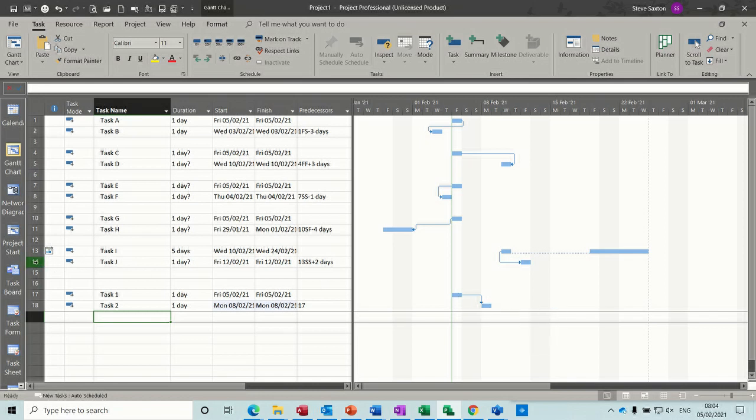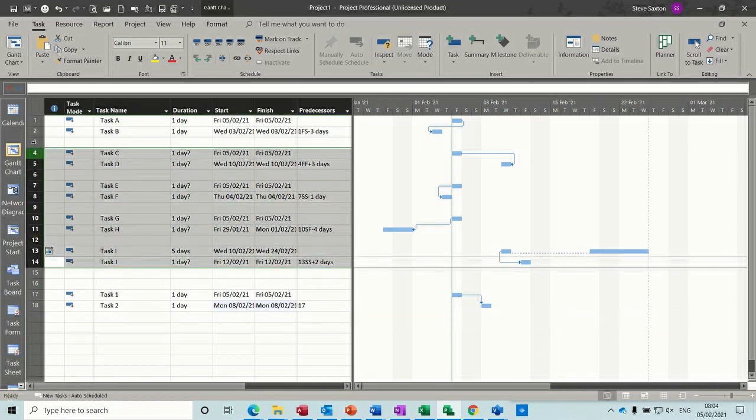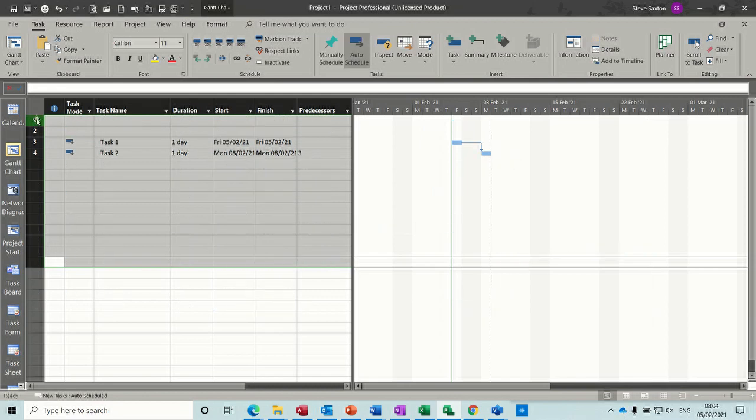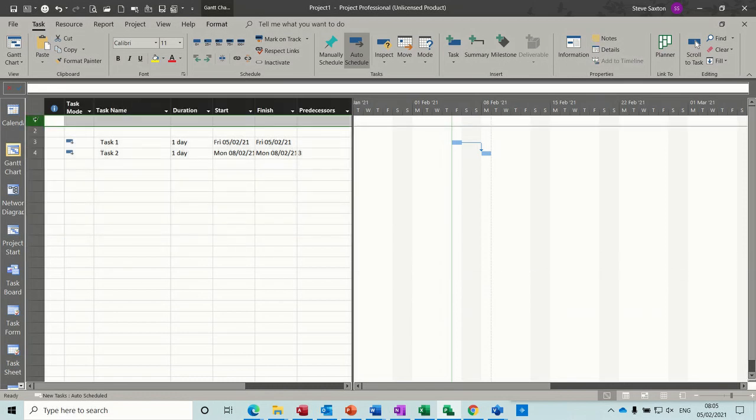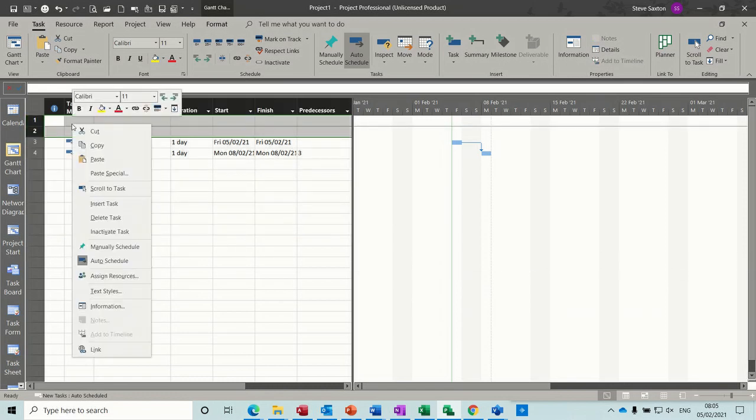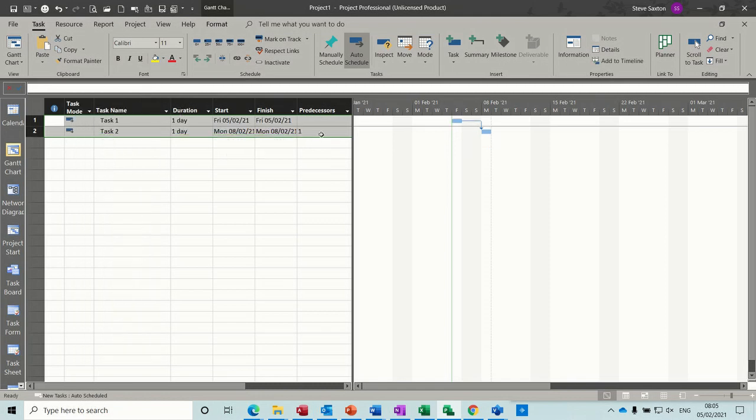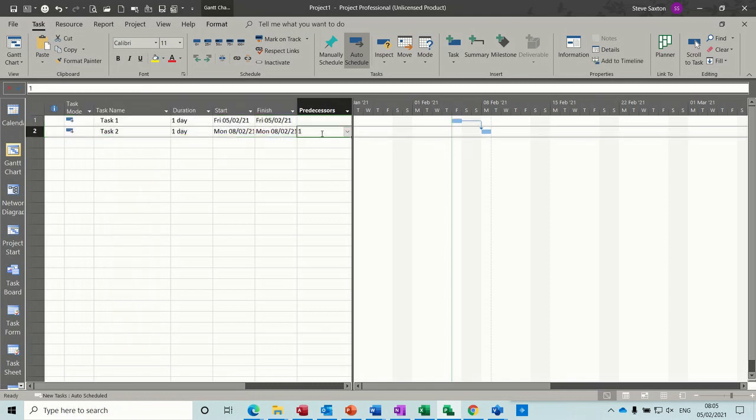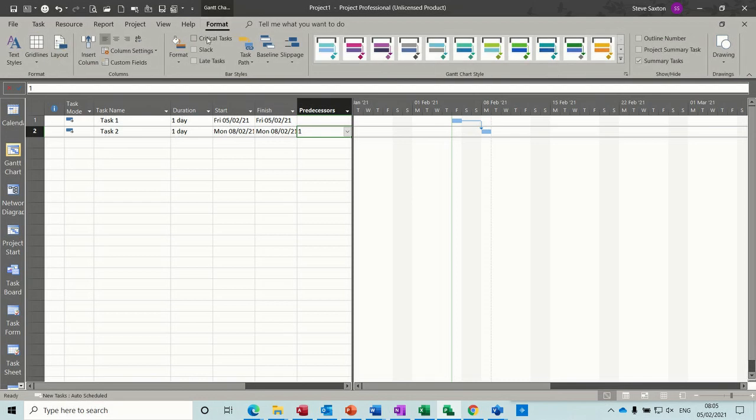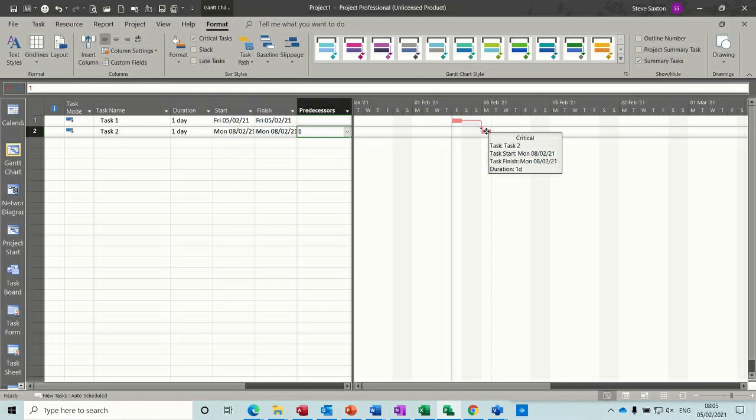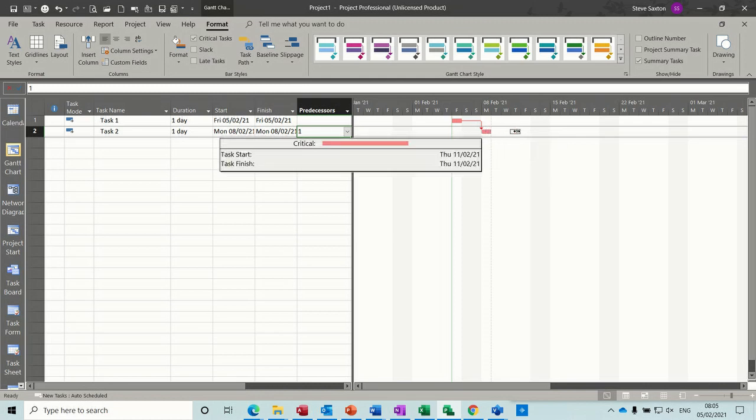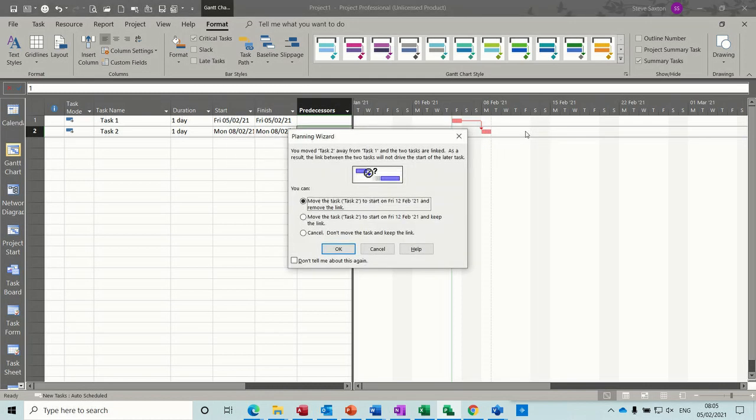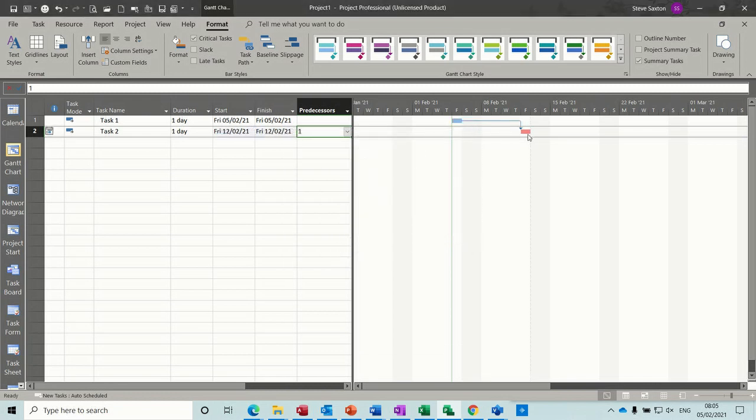So what I need to do first off, is get rid of all of this. Just delete these two off at the top. And if I put the critical path indicator on, critical tasks, at the moment they're both red. But if I move this five days, only this one has gone red. This one is now not showing a critical path, because there's slack there. You can't have a critical path if there's more than one-day slack.